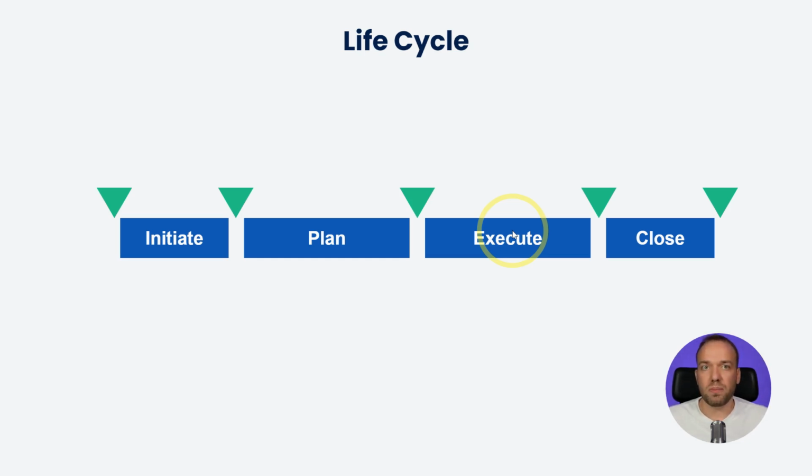And why this concept is important is because the life cycle will be reflected in the scheduling. Later on, I'm going to show you how. But these are the various groups of actions in the schedule. The green triangles represent gates. Normally, between the stages, you have an approval point, and a gate is a forward-looking decision point where the steering committee of the project approves the next stage. Again, I'm not going to deep dive here. This is more of a methodology topic for discussion.